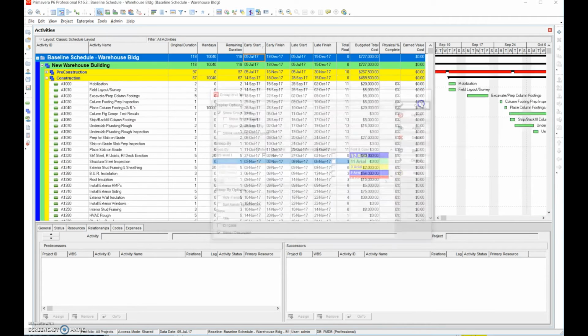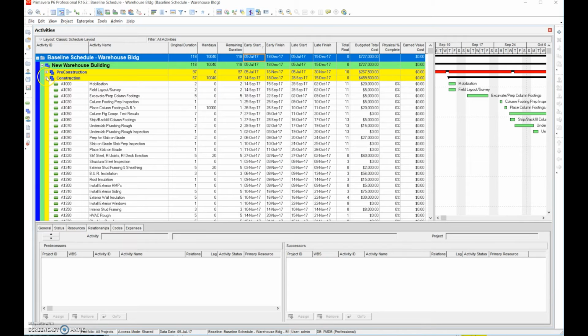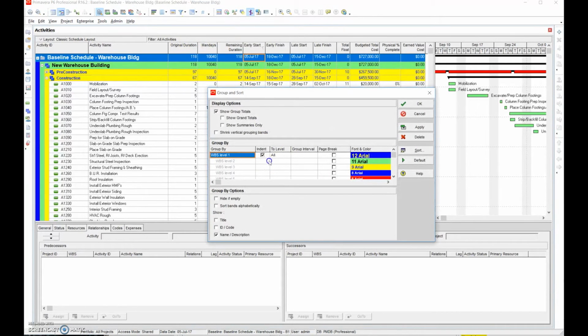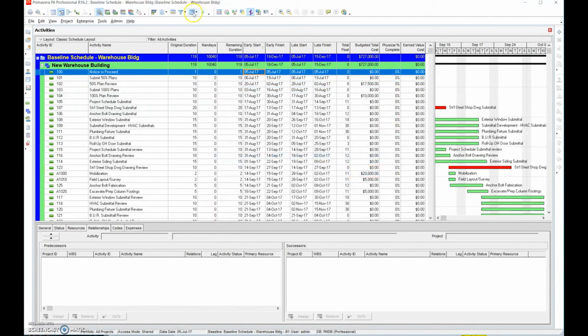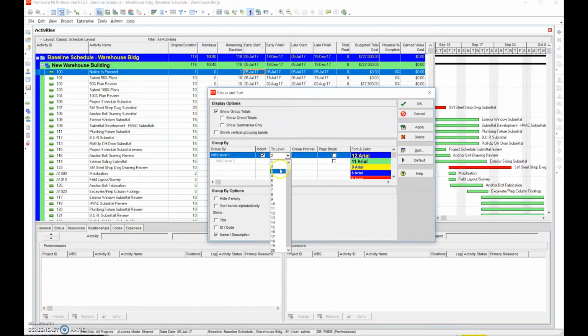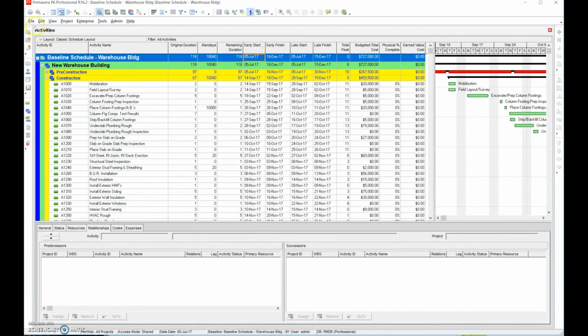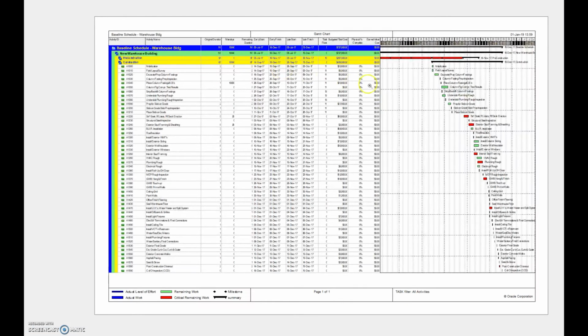So we'll go ahead and save all. And we could minimize that. The easiest way to do this is minimize it, and go to only show a couple levels, like 2 levels. Oh, excuse me, 3 levels, depending on how many levels you have within your schedule. And then you can go from start and go Print Preview, and this is only going to show construction tasks. This is helpful for a superintendent because he can see exactly what's going to occur on construction related tasks. Continuous flow.